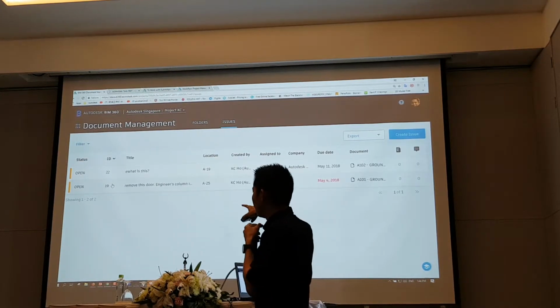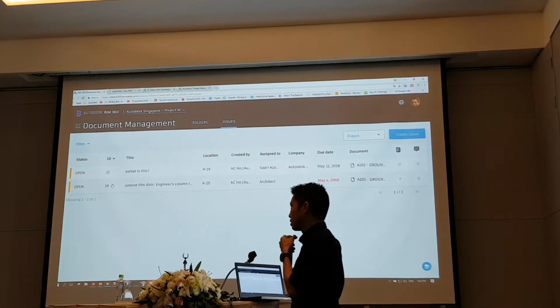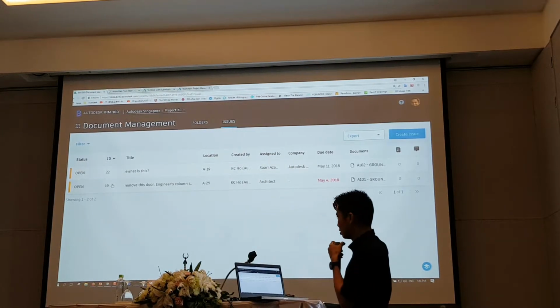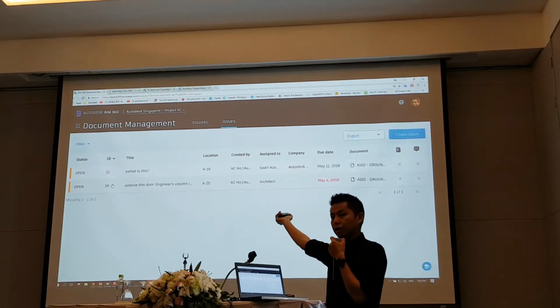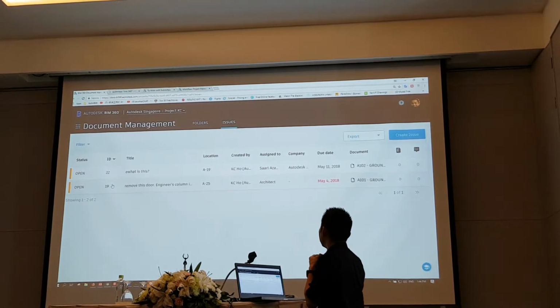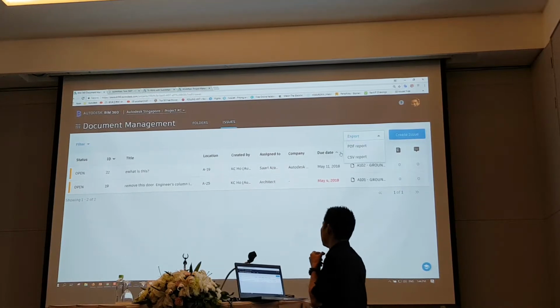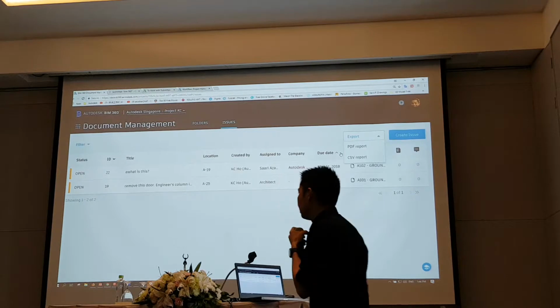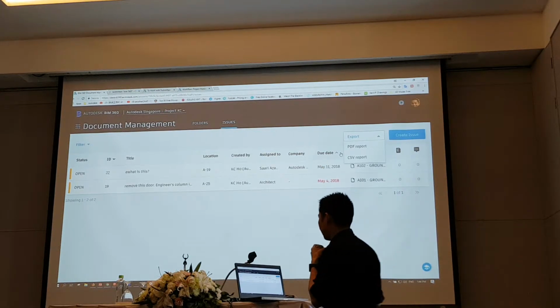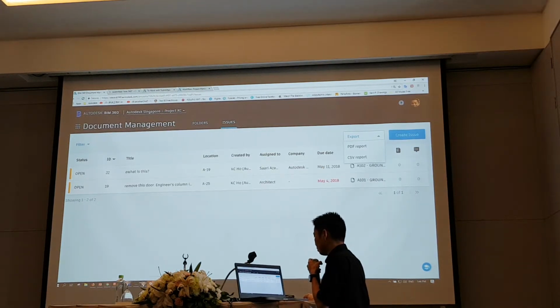I really want to know who is not doing their work yet. So now I've got two. During the CCM meeting, site meeting or client meeting, I can bring up this report and ask why you're not reacting to this issue yet. Now, this report you can export into PDF or Excel. PDF is very simple. I can show you the PDF report.